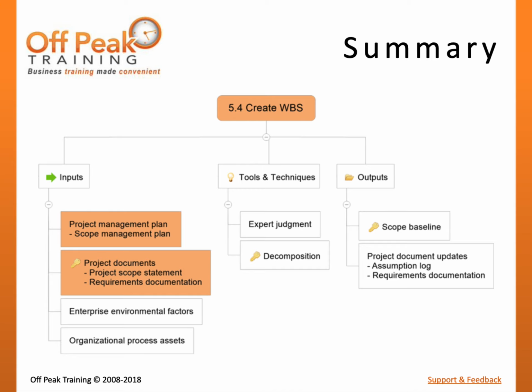This baseline is considered to be part of the project management plan and will be used as an input to many other project planning processes. It will be used to guide the execution of project work and provide a reference point for performance measurement during monitoring and controlling. Once established, the baseline can only be changed through formal change control.